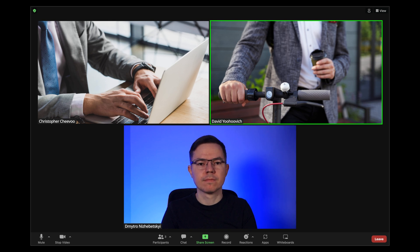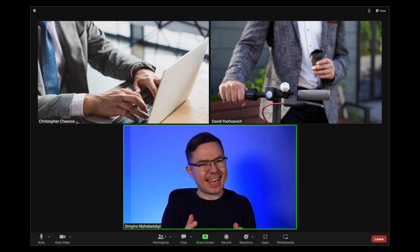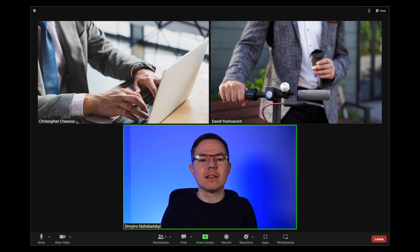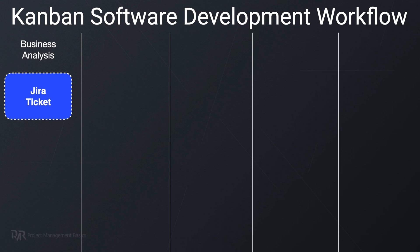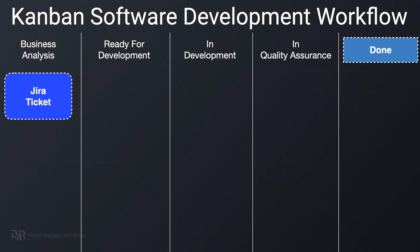Delana said she'll provide all the required information. Also, she said they want to do the project with Kanban because it works best in their organization. No business analyst is a bigger problem for me. And I have two other projects, so writing requirements will eat up a lot of my time. That's why I'll have to analyze the specifications they promised to provide and create tickets in Jira — it becomes a critical step in the whole workflow, and I'll be a bottleneck. Our board will look like this: I'll add business analysis as the first step.